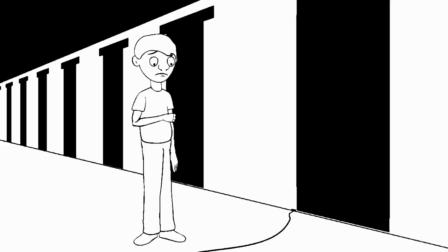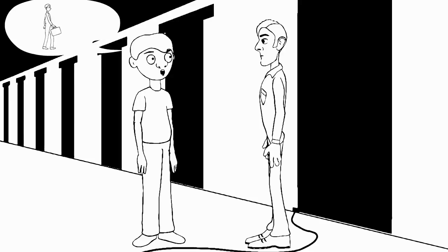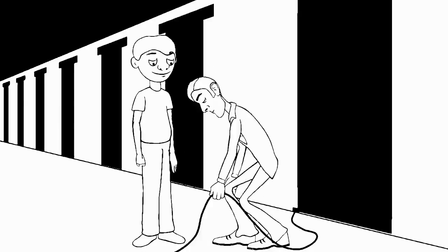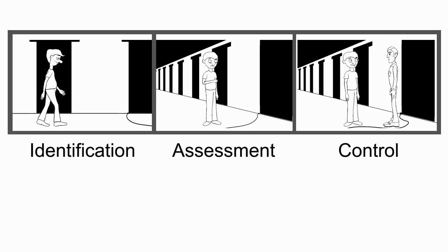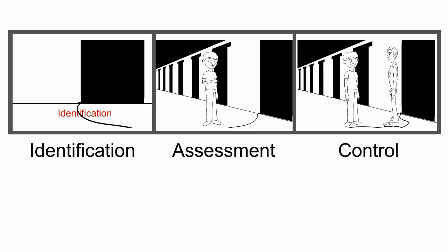This is risk assessment. You go and talk to the man using the electrical cable, explaining to him the hazards of leaving it there in the hallway, and ask him to remove the cable or tape it to the ground securely. This is risk control. In that example, you saw into the future, the possibility that someone might fall over, and you did something to prevent it. Likewise, we could have anticipated that the crane might fail and prevented its failure in different ways, like, say, maintenance. In this example, we went through a full cycle of risk management. We identified, assessed, and controlled the risk.